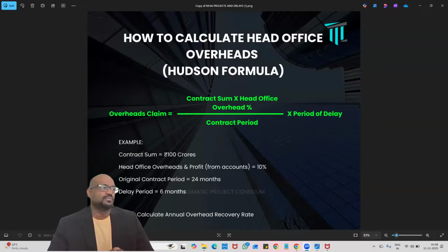This video will be discussing how to calculate head office overheads using the Hudson Formula. Head office overhead is a single line item which comes under the prolongation costs. Prolongation cost is nothing but the compensable cost for the contractor by the employer when the delay is declared as a compensable delay.